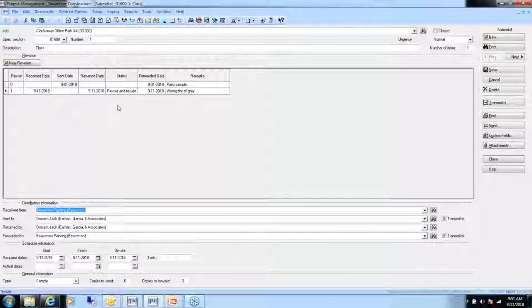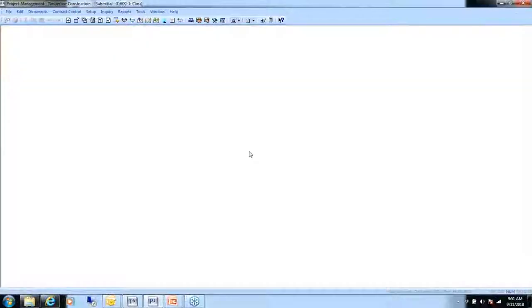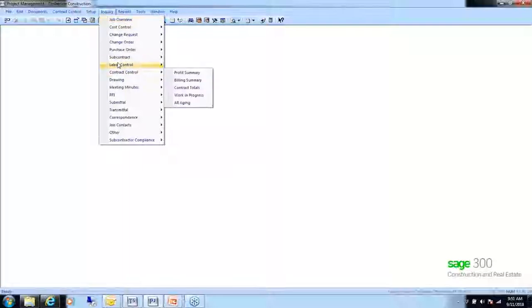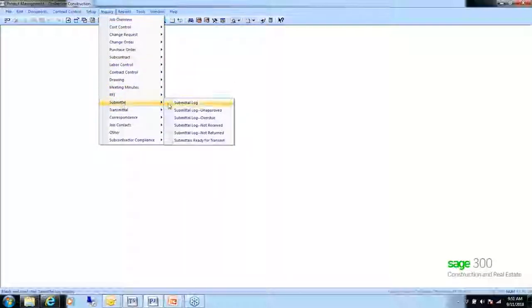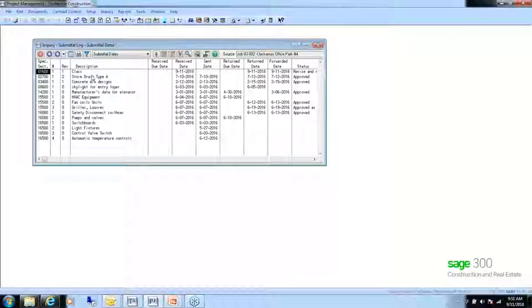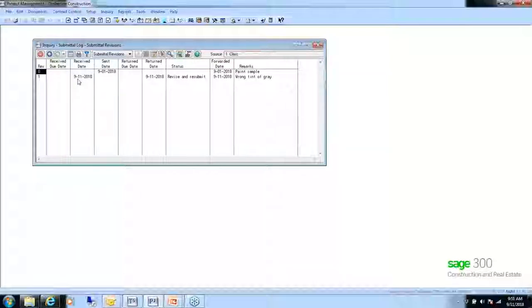What we're doing is documenting all the samples and decisions made about those samples within project management. Under Inquiries, go to Submittal — you have a submittal log where you can see the submittal in a drill-down inquiry view showing the same information as the form. This is a good way to track samples going out for approval.